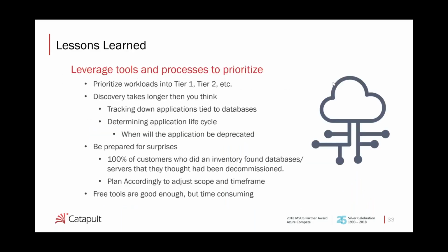All right, so you run a tool, either it's MAPS, Azure Migrate, or you pay for a tool to use, and you run it. First of all, discovery is going to take longer than you think. As I said, we recommend somewhere between 2 to 4 weeks of running a tool. It doesn't stop there, because you're going to come back with servers, either database servers, SQL servers, or applications that you don't know what they are. So you have to build time into your assessment to track those down.